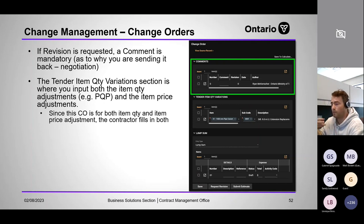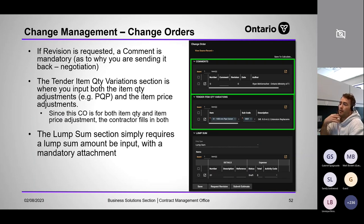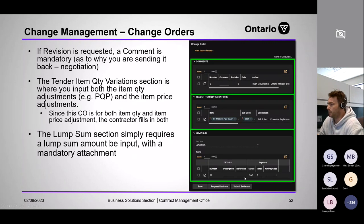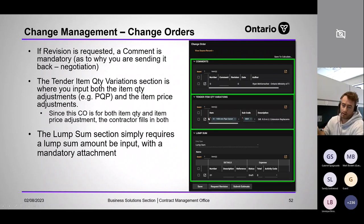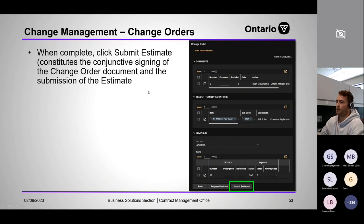If only method A is selected, you can only edit the quantity; if only method B, only the price. For this example both are selected so you can edit both. The lump sum section is at the bottom — in this example it was forgotten when issued, so in a real scenario you'd request a revision. When complete, click Submit Estimate — that's the equivalent of signing the change order and submitting the estimate.